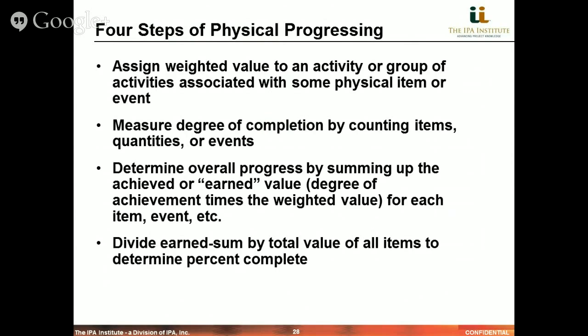And so by dividing your earned sum by the total value, you determine a weighted quantitative-based percent complete.